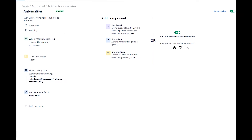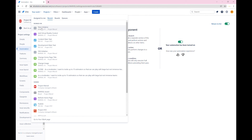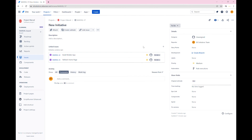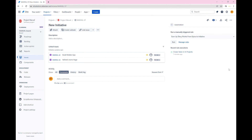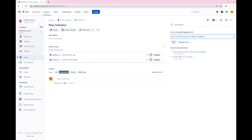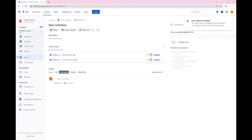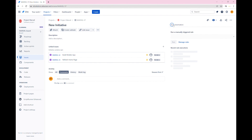Let's go back to the initiative that we just created. Click on rule executions. You can now see that the rule — sum up story points from Epics to initiative — is available for execution. Click on run. As you can see, the story points for the initiative has been updated to 35 story points.